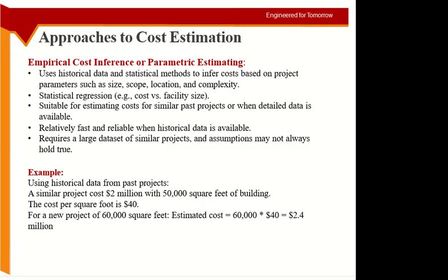Then we have the other approach, which is called empirical cost inference or parametric estimating. In this, you are using previous data to estimate the cost of the project based upon the parameters of the project, so that's why we call it parametric. Okay, so I am trying to calculate the cost of the project using the parameters of the project. So for example, if you look at the examples given here,